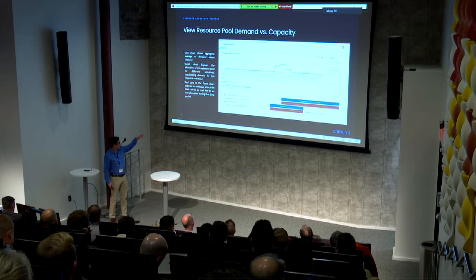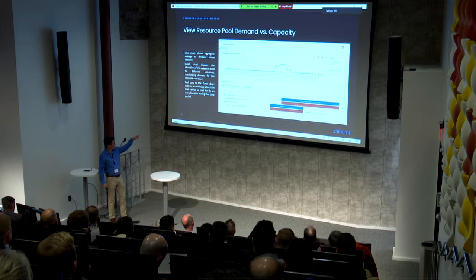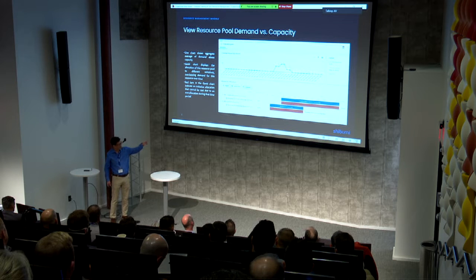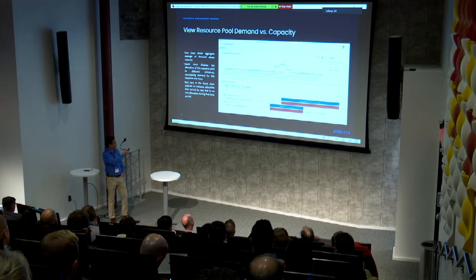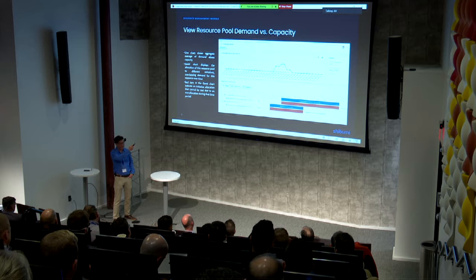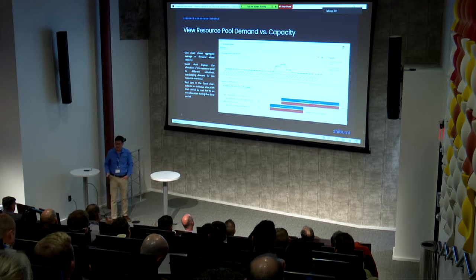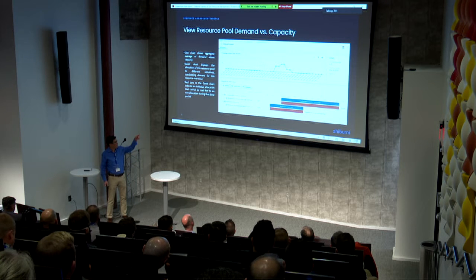And here we can see at the bottom, we have these two projects, these two initiatives, that have an allocation for a developer over certain time frames. And you can see that they overlap there in the middle. The capacity for this pool, the developer pool, just in this example, is 1. So when we have demand for 2 different projects to have developers allocated to them, we're going to be over. And you can see in the chart above, we're showing the overages.